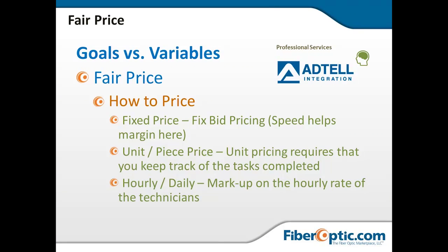Hourly markups, or hourly rate for technicians, is obviously another one that is relatively good for, I guess, the contractor, who knows he's able to get a steady margin over what his costs are. But you've got to be careful of that with yourself as an end customer, to make sure that you know what the ceiling is, what is the max cost that I'm going to receive on this project, to make sure that it doesn't go over your budget.